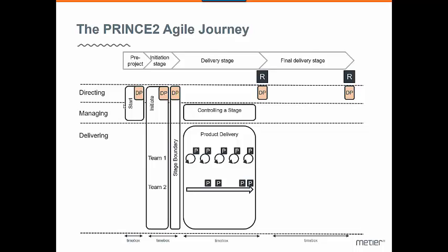They're using Kanban. They're working flow-based and releasing when they are ready to release something. They can also plan out when they're going to release it for sure. And you want to be able to see that, because there may be dependencies between these teams, and that's why you do the planning together in managing a stage boundary.